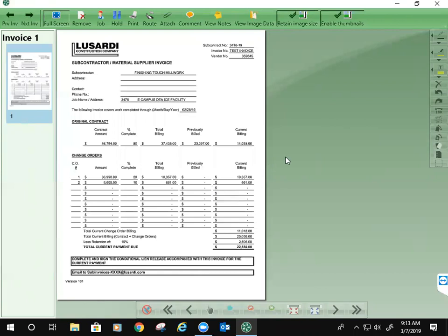And it's going to be percentage driven from now on. So they can't just pick and choose net dollars that they want to see. You're going to have to put in a very specific percentage. So they'll have to sort that out on their end to get where they want dollar-wise and populate everything by a percentage. A lot of the fields are locked, so they can't mess it up. You're just looking for them to bill out their dollars and not make any other changes on there. So it's going to end up being very useful.